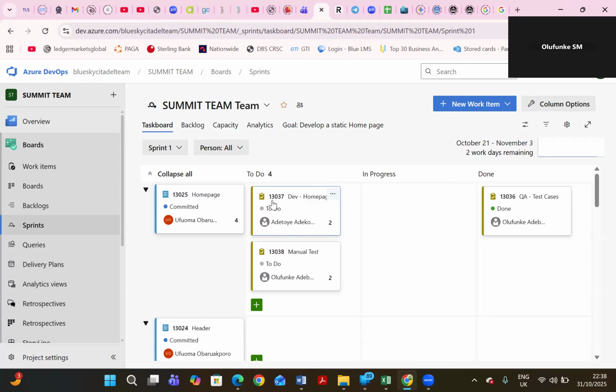So what we're looking at for ready is the checklist we're marking on the story itself. Does it have the acceptance criteria? Does it have a description? Does it have a wireframe? Has it been refined and everything? So it's ready for us to work on. That's what your definition of ready is. So all this task creation is part of what we need to do for visibility purposes that they are working.